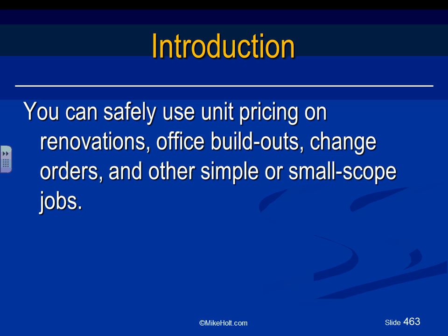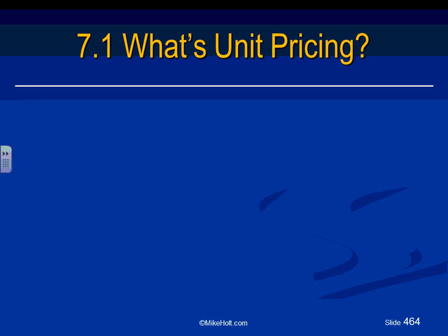Also, if a developer comes to Burnsville and wants to build 100 standalone residential dwellings, what the contractor can do is provide a unit price for every unit. Say each one of these units is 4,000 square foot. We will do the electrical system as a unit price for you, everything complete, designed, installed, laid out, for $20,000 a unit. So that's also another unit price that general contractors use all the time.